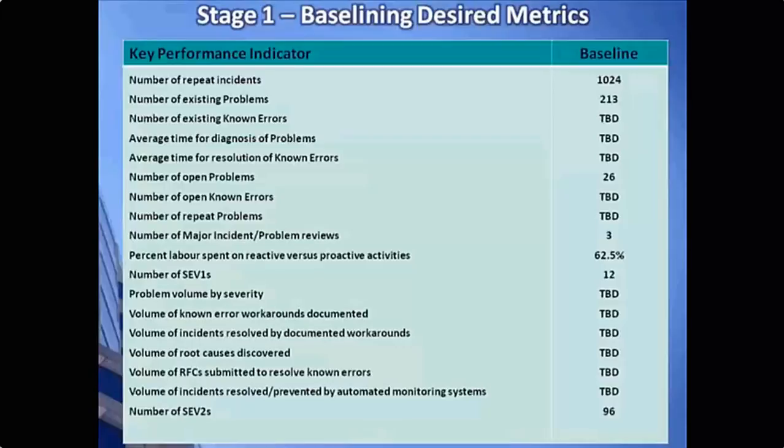Make sure when you start that you baseline your metrics. So after you've identified what your CSFs and KPIs are, produce that report that shows where you sit today from day 1, even though you haven't really implemented anything in terms of a process.